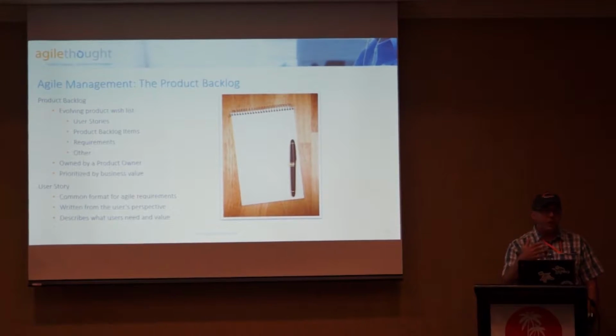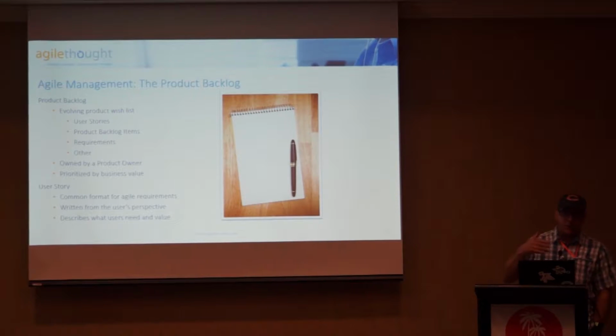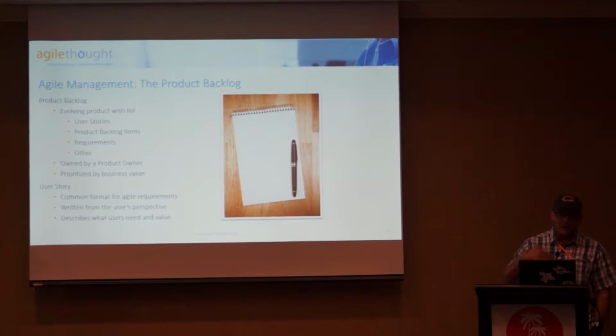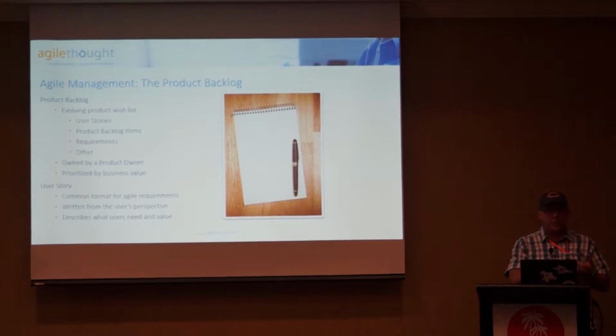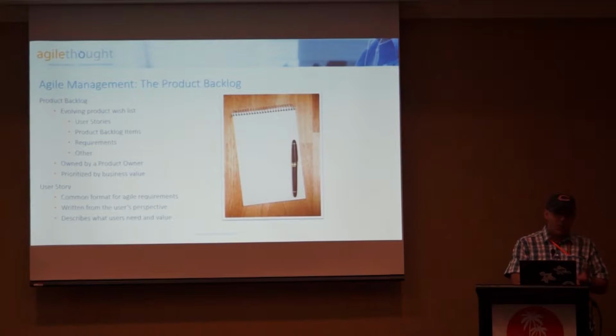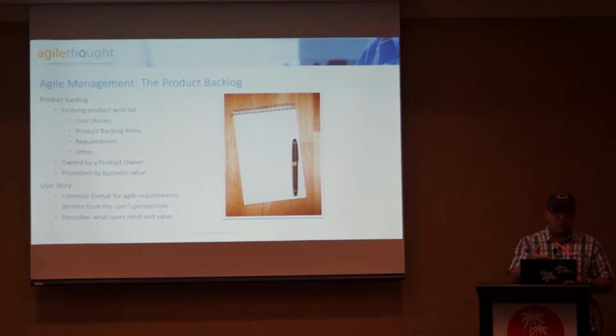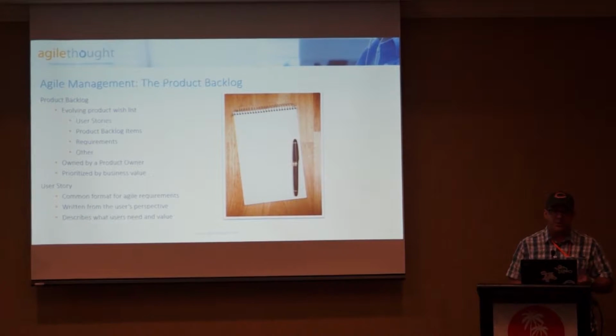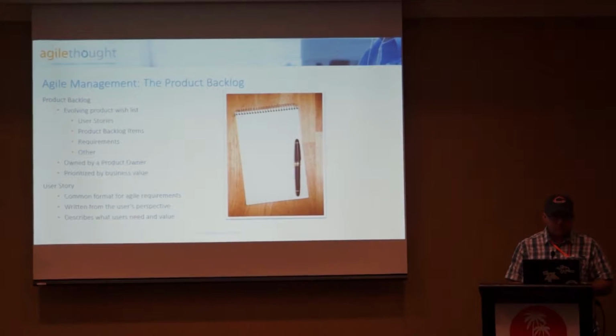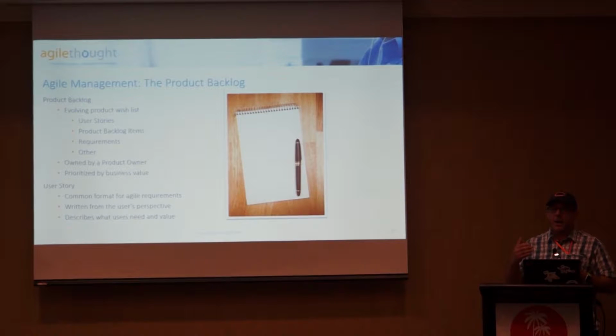All right, and so next we'll talk about planning the release. When we start planning a release, we start to look at the backlog and we start to do what we call evolve the backlog. We start to add user stories or PBIs, product backlog items. It just depends on what you chose as your template for TFS, whether you're using Scrum, Agile, or CMMI Waterfall. Scrum will have the PBIs, Agile will have the user stories, and CMMI will have the requirements. Again, this is a list owned by the product owner.